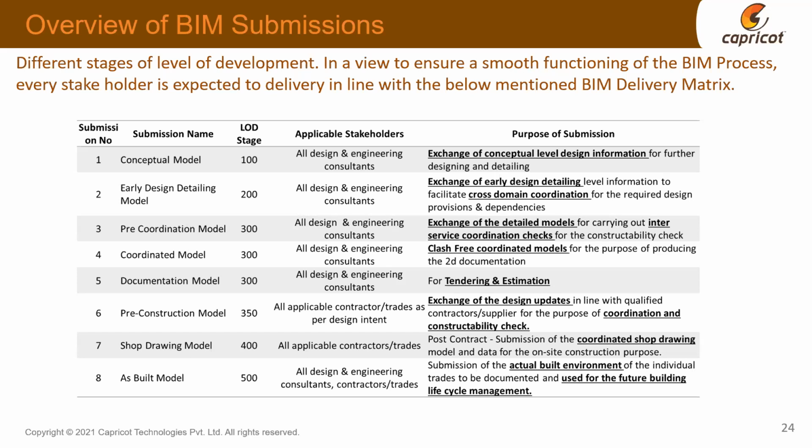Let's say it's a facade drawing: as per the beams and columns, how the facade panels will fit in. He'll make the coordinated shop drawing on that basis, and finally the construction will happen and the as-built model will be prepared, and this will be LOD 500.